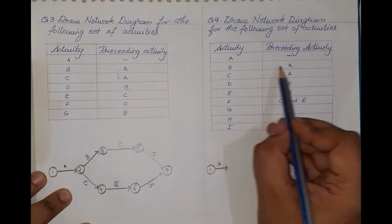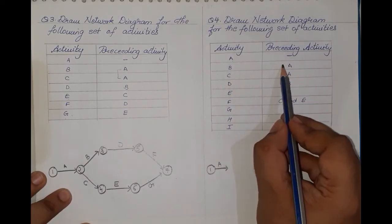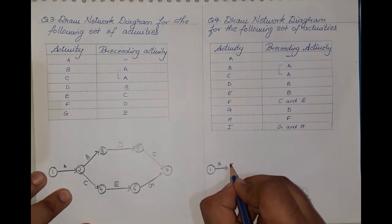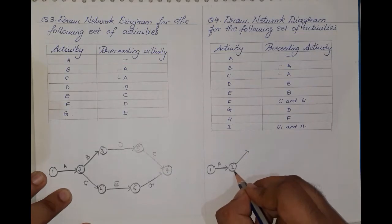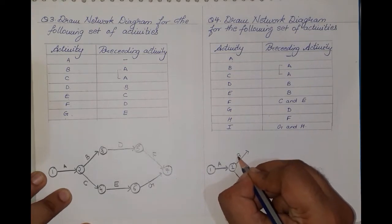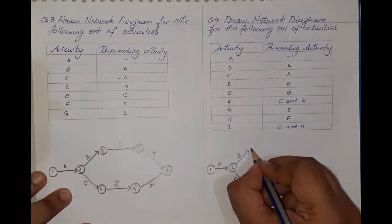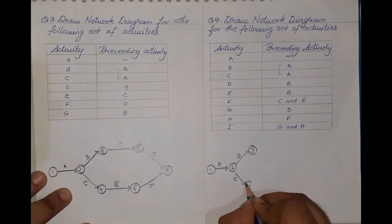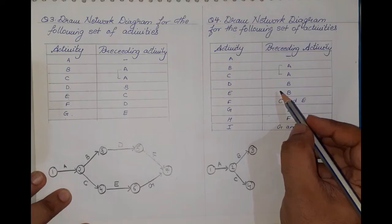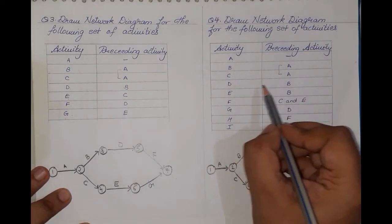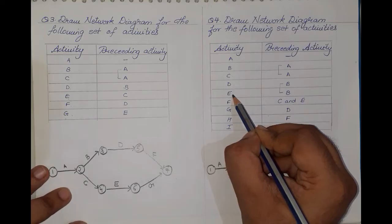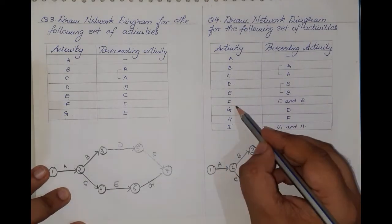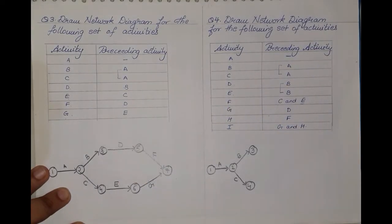From activity A, we can see that activity B and activity C have both evolved, so from activity A we have two activities bursting out — activity B and activity C, which will be event number three and event number four. Going ahead, from activity B, activities D and E have both evolved. Now notice that from E, activity F has also evolved, and from C, activity F has also evolved. So there is a lot of merging and bursting in this case — look at this very carefully.